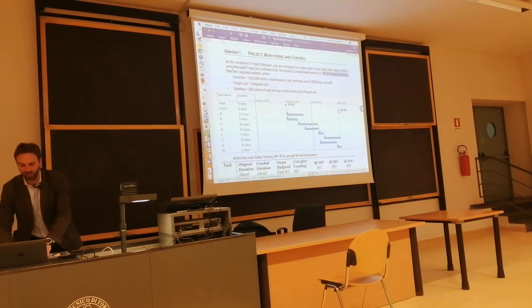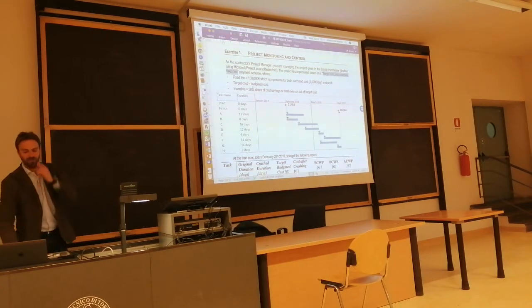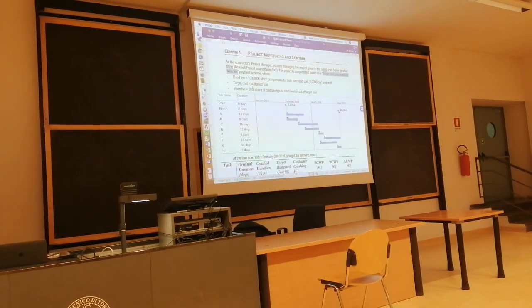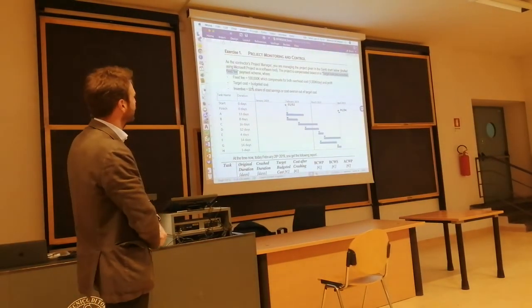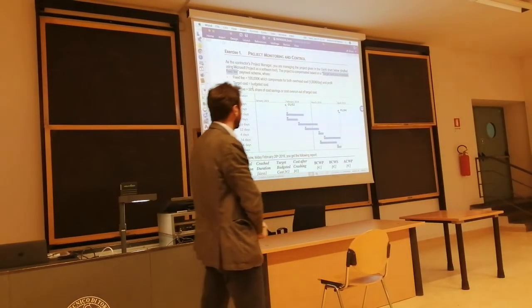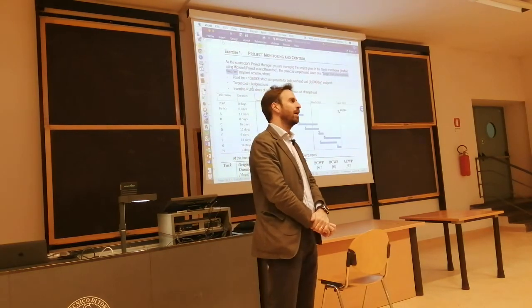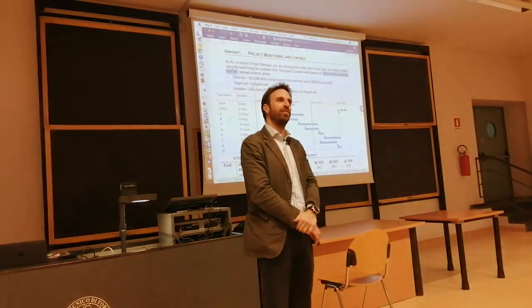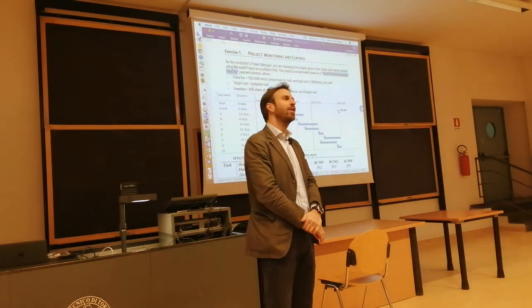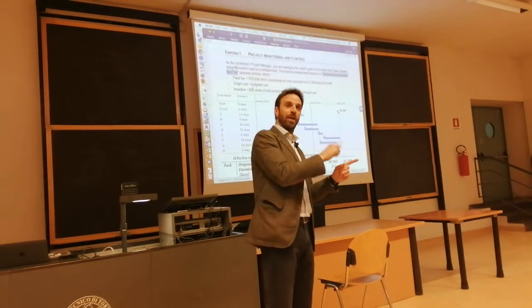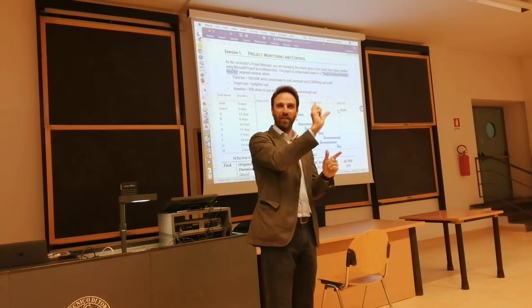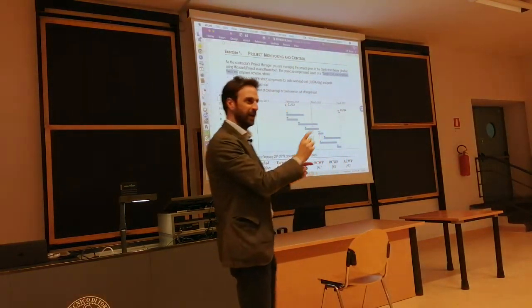Target cost plus incentive fixed fee. Is all cost reimbursed plus incentive fee with a 50% sharing on cost savings and cost overrun? And you would like to maximize your profit. Cost is reimbursed plus or minus savings or cost overrun. All right?